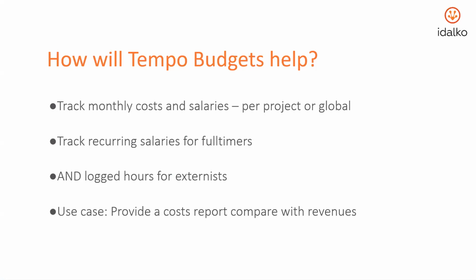And even if you have some external employees, like some freelancers or contractors that actually log hours, Tempo Budgets will transform these logged hours to actual, let's say, monthly rates or hourly rates, so you can track them in Tempo Budgets, again, as costs of the project.